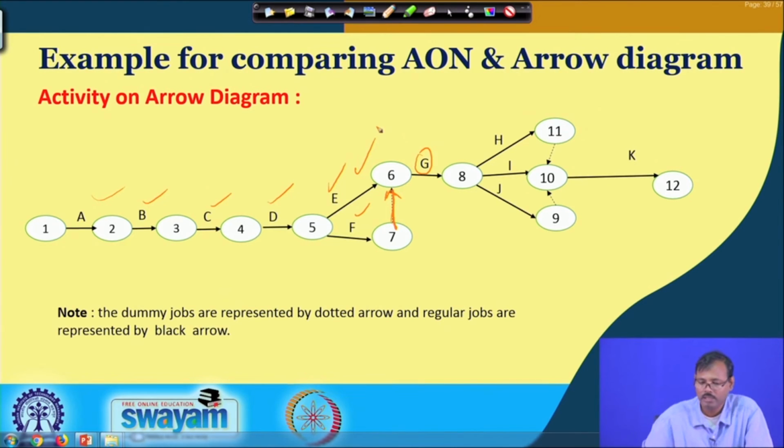So, lighting and scaling have to be completed prior to the start of marking, but after marking, simultaneously we can carry out these 3 operations, and the face will be marked after the completion of these 3 operations. That is why the dependency of this one is being shown here using these 2 dummy jobs. So, now this is the activity on arrow diagram, which presents the cyclic operation of one underground mine face.